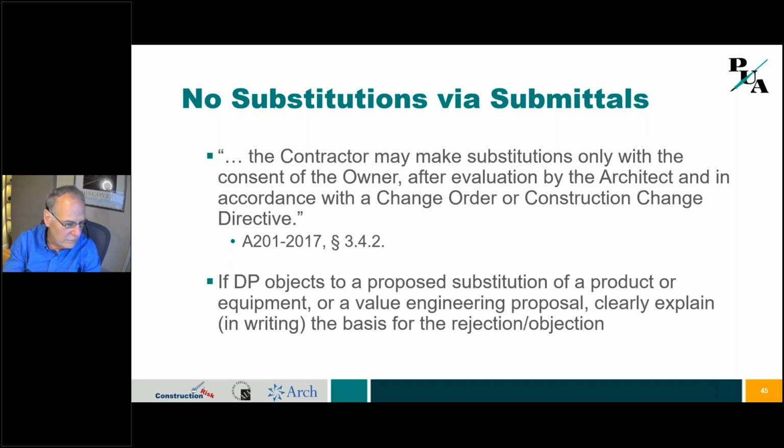And then the contractor comes and says, "Oh yeah, they approved this substitution." Well, no. The only way we could approve a substitution is if you'd come in and notified us that there was this change. You didn't balloon it. You didn't show anything. How are we supposed to know you had changed this? And the only way it can get changed is through a change order. So again, if you object to that substitution, just give your reasoning. Okay, next slide.